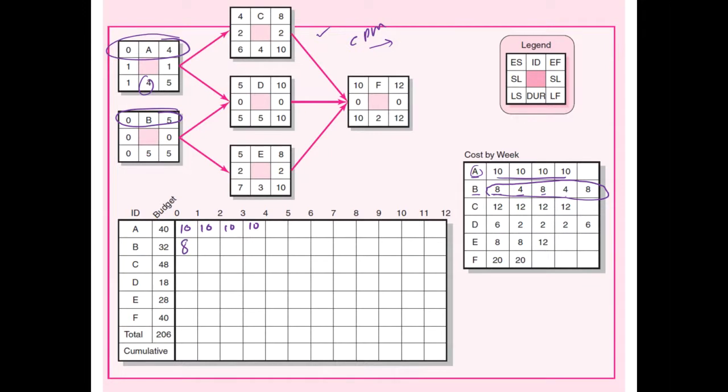So we will be receiving 84848. The third activity is C, which is beginning after activity A, and it's a 4 week activity, and we are receiving 12K per week.